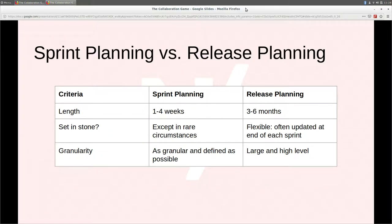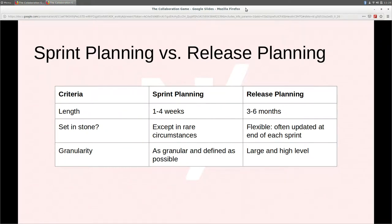Granularity is kind of interesting. With sprint-level planning, we want an exceptional level of granularity — ideally anything that comes into our sprint we've had everybody consider from all angles, detailed what we're building, answered any unanswered questions, so we've got as much information as possible when we start doing the work. We want granular, small tasks or tickets in a sprint. Whereas with release planning, it's more at the epic level or big picture — although there are opportunities to get more granularity as you put that stuff together.